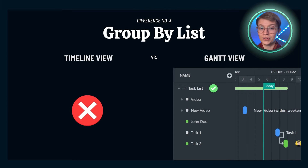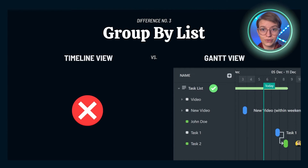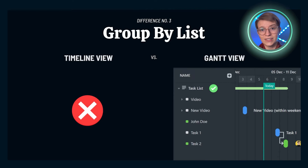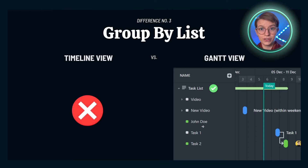The third difference is actually related to that — grouping by lists. Despite timeline being super flexible and allowing you to group by assignees, custom fields, due dates, and all that, it can't let you group by lists in your ClickUp hierarchy. Your lists and folders are inaccessible as far as timeline view goes. So if you need to see things broken out by what list or folder they're in, and just seeing breadcrumbs in the top of a task is not enough, you're going to want to use Gantt view, which forces you to stay inside your ClickUp hierarchy.